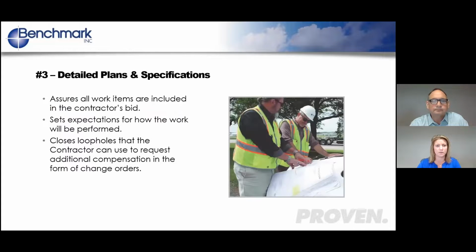Thank you. So step number 3 is detailed plans and specifications. We talked about geotech, we talked about survey. Both of those play into being able to develop detailed site-specific plans and specifications. So what are the benefits of detailed plans and specifications? Well, it's going to assure that all of your work items are included in the contractors' bids that you receive.